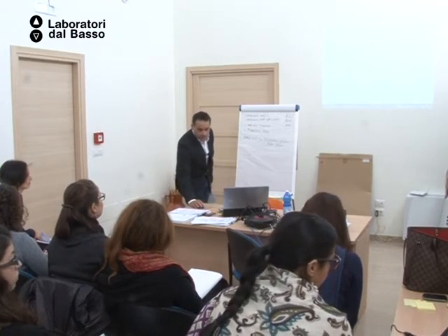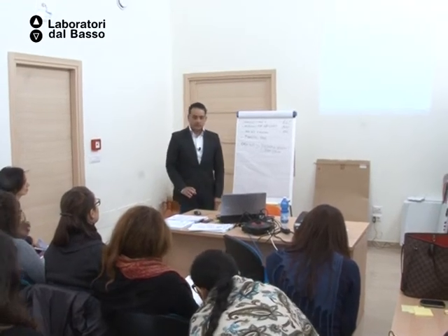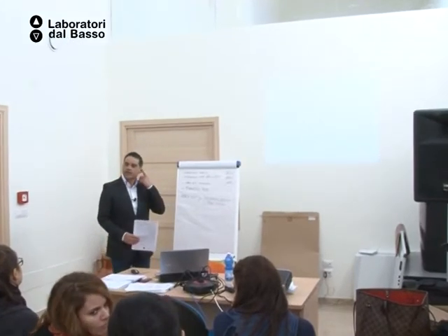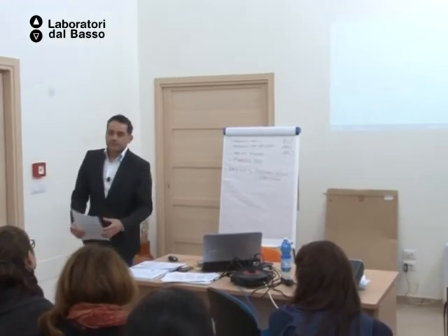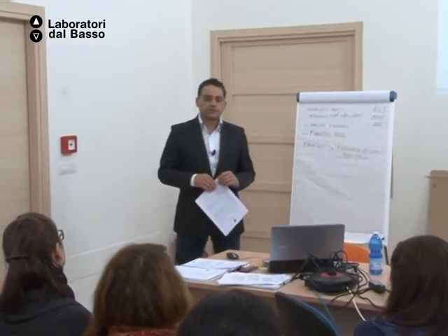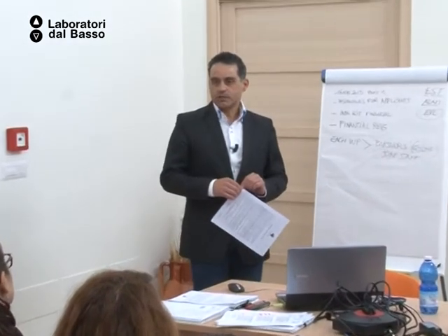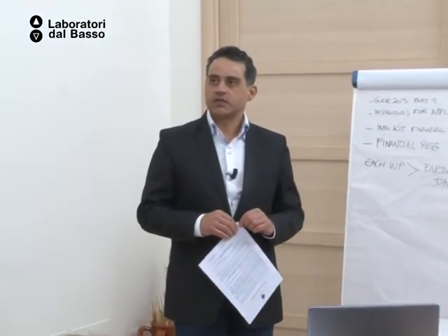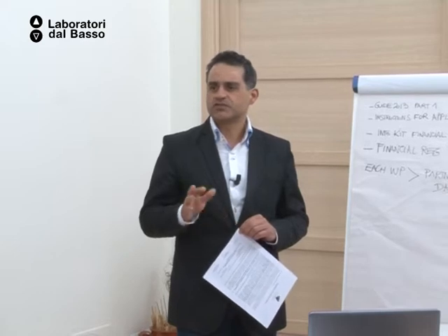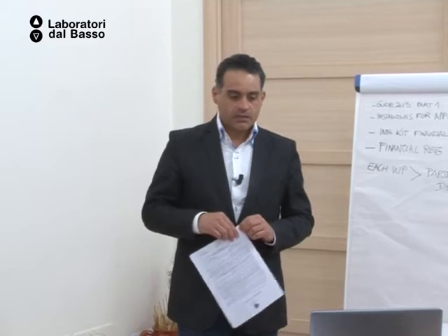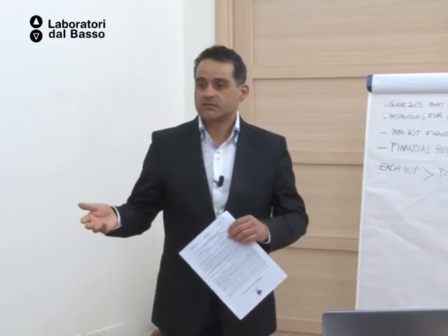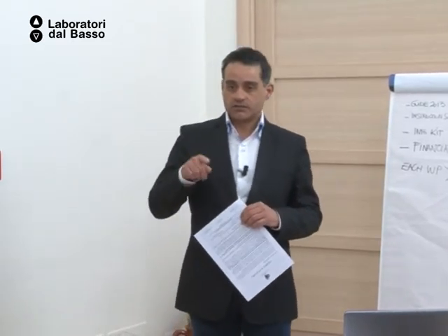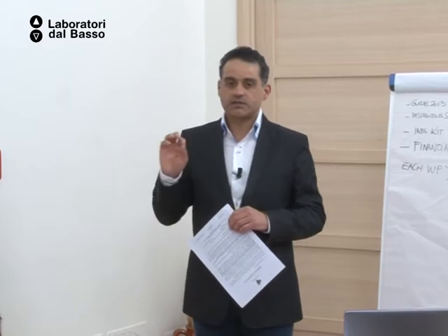Lump sums. Flat rates, or in the accountancy language, scales of unit costs. To travel to Belgium, you can only receive a top of 232 euros a day for travel and subsistence. And if you need 2 days, you will receive 464 euros. These are scales of unit cost, and these are flat rates.